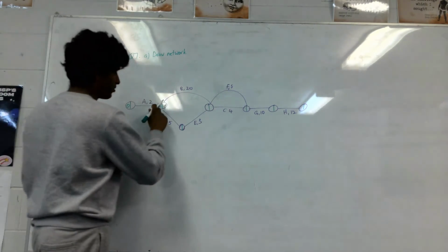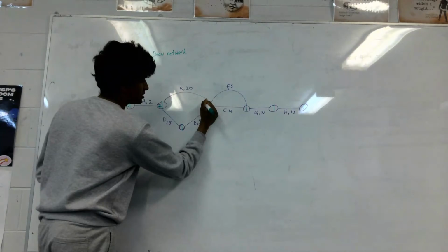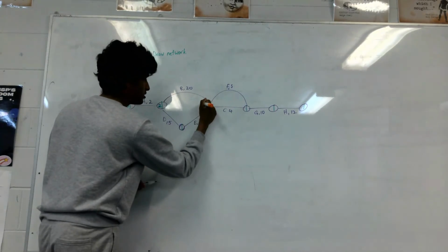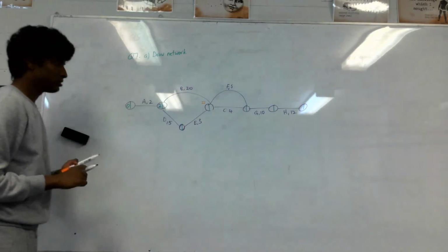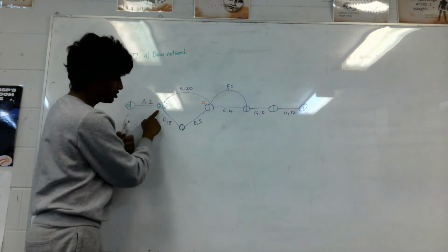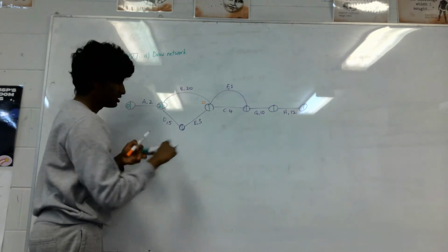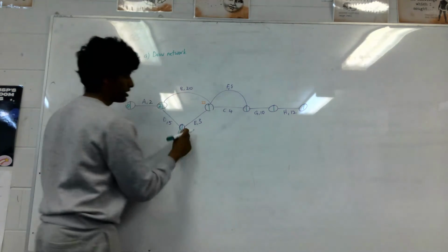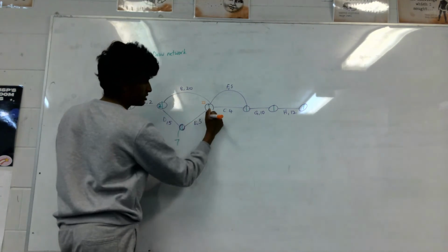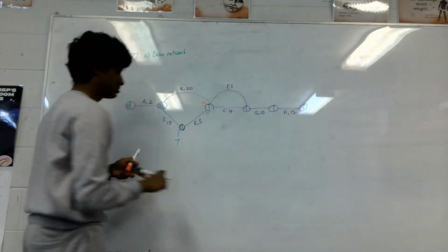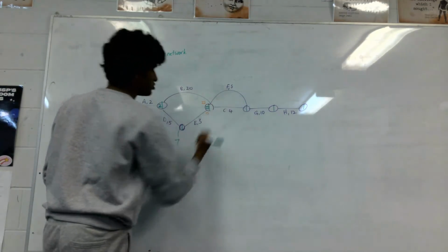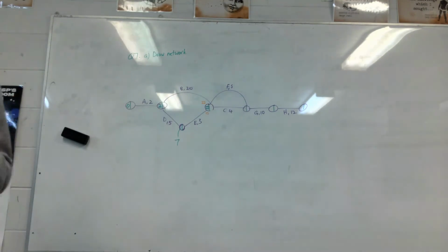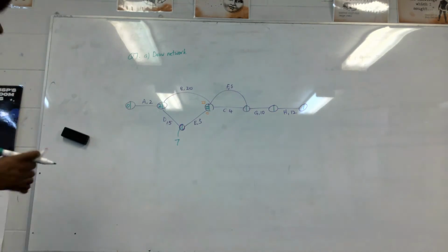We're going to go from 2 to 20 minutes, so this is 22 minutes in total. Down here we're going to 2 minutes plus 5, that's 7 minutes. Plus another 3, we get to 10 minutes here. So we need to make sure there's 22 minutes, so all those activities can be done.